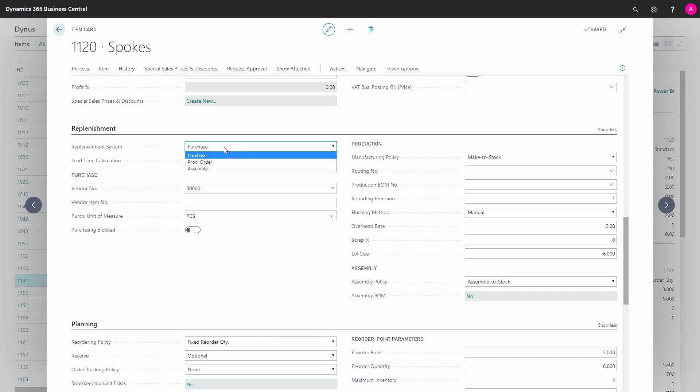If it's a purchased item, the lead time calculation field is relevant to set up. This represents the time from ordering an item until we expect it to arrive at our warehouse receipt ramp.